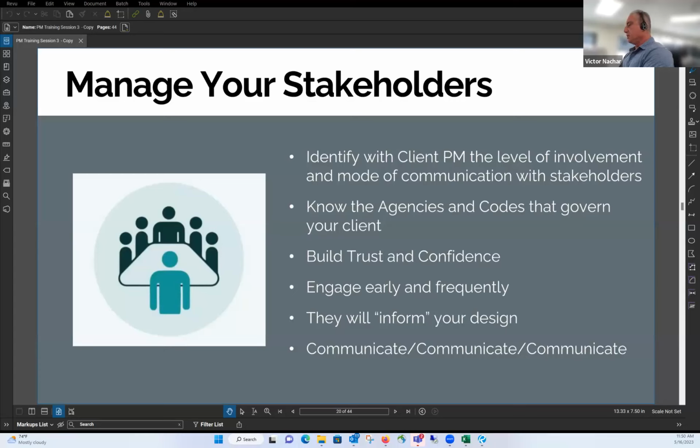For example, one thing that we went through, associated with experience, is we sign a contract with 3 parties: developer, NISO, and Avangrid. NISO doesn't have any liability; they're in the clear. But Avangrid does if we do not respond back to the customer in a timely fashion. The contract has something called pro forma, which is set in stone, that says the connecting transmission owner needs to respond in 2 weeks.